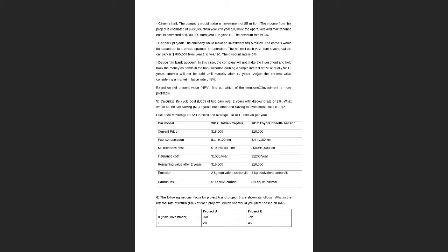And for finding the interest earned after 10 years by using the simple interest, it's just the simple interest formula, which is principal times time times your simple interest rate. Okay.